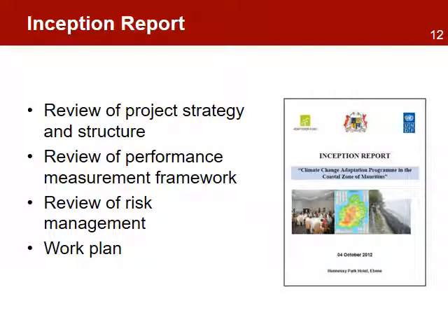The Inception Report is a good practice of RBPM that provides a review of all the information available at the beginning of the project, usually 2 to 3 months after the project started. It's developed by the project manager. The purpose of this report is to ensure that all key stakeholders have the same baseline information, the same understanding, and are committed to the implementation of the project. The content of this report might include a review of the project strategy and structure, a review of the performance measurement framework, a review of the risk management plan, and the work plan.